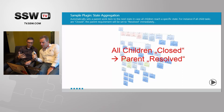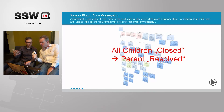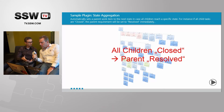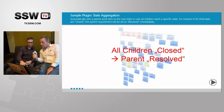Another aggregation use case is aggregating states. If all child tasks are done, you want the requirement to be in a resolved state — ready for test — automatically. With the Scrum template, a product backlog item could automatically be put into the 'committed' state as soon as one task goes into 'in progress'. It's all configurable to your process templates.